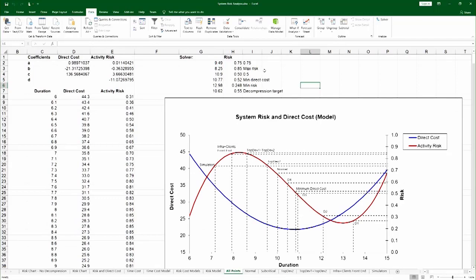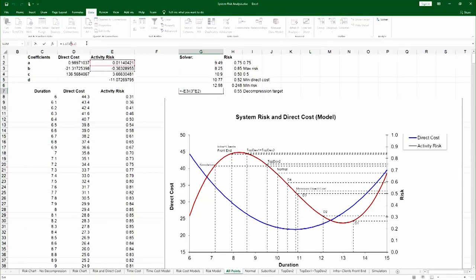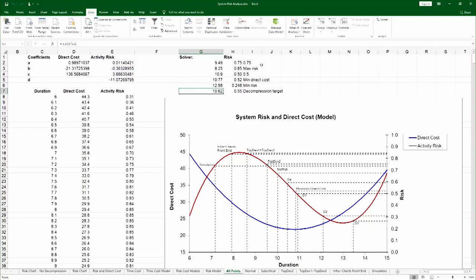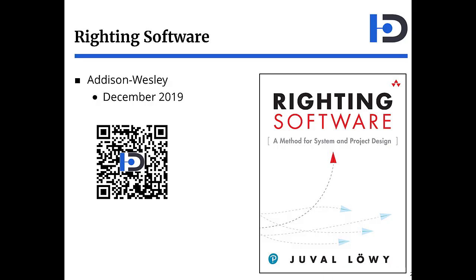Here is the same chart with additional points. You have the decompression target, which is done using the second derivative technique — this actually only appears in Chapter 12, not Chapter 11, but it's included here as a bonus. You also have the point of minimum direct cost, again calculated based on the coefficients of the direct cost curve. For more on these ideas and techniques, see Writing Software.